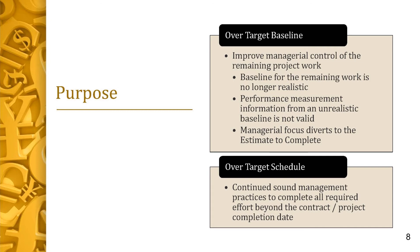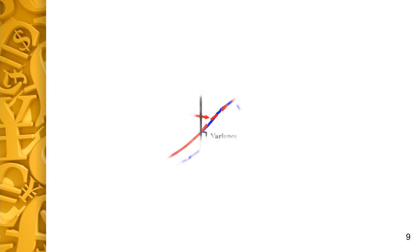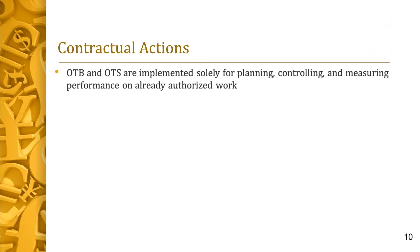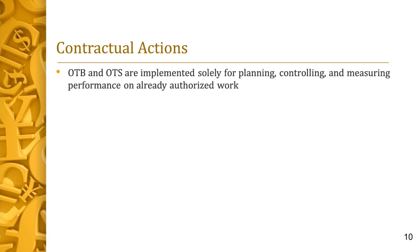The purpose of an over-target schedule is to facilitate continued sound management practices to complete all work beyond the contract and project CD4 completion date. This is an illustration of both an over-target baseline and an over-target schedule. Notice the performance measurement baseline from time now to planned completion. In this example, the decision was made to eliminate both cost and schedule variances, so BCWS and BCWP were set equal to ACWP. Note that the OTB and OTS are implemented solely for planning, controlling, and measuring performance on already authorized work.